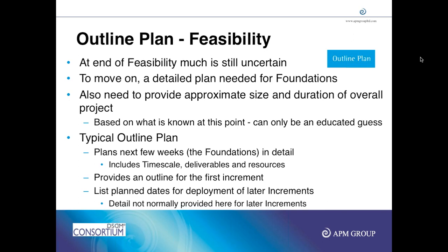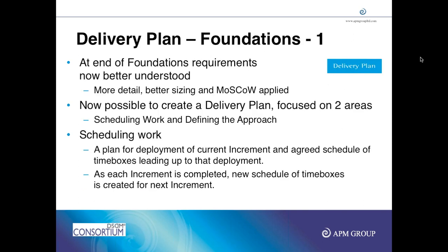But it tells me in detail during December what the schedule is, how we are going to do planning and the foundations part. For the next year it doesn't give you details; it gives you detail for the immediate future, because you can foresee it, you know what's going to happen, how and who. So next phase detailing is done in Agile and in every type of project management, called just in time scheduling.